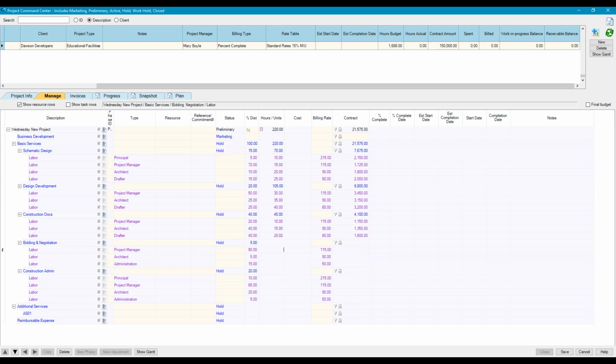And that's as much as it is, but for your team, it would take longer because they're actually going to be assessing the level of effort it's going to take for your team members at these levels, right? So, all right. And notice as I plugged in hours, it took my units times my standard billing rate, developed my resource fee. All of my resource fees for each phase added up to the phase. All of my child phases and my basic services added up to that level, which then added up to the project level. One template, two budgeting methods. So very easy to do both in one.